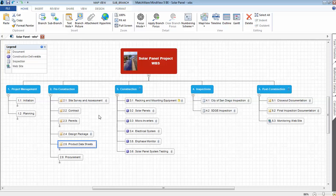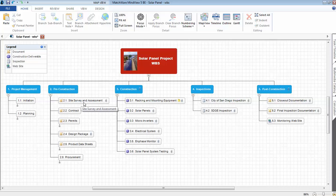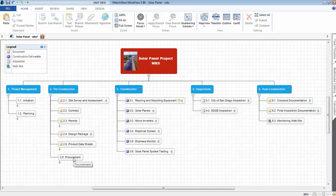My third level, I've got deliverables. So this is what had to be delivered for this particular project. Under pre-construction: site survey and assessment. Once that is completed, the contract was assigned. We then have permits that we had to obtain. A design package was prepared. Product data sheets downloaded from the web. And we hired Stellar Solar to install the solar panels.